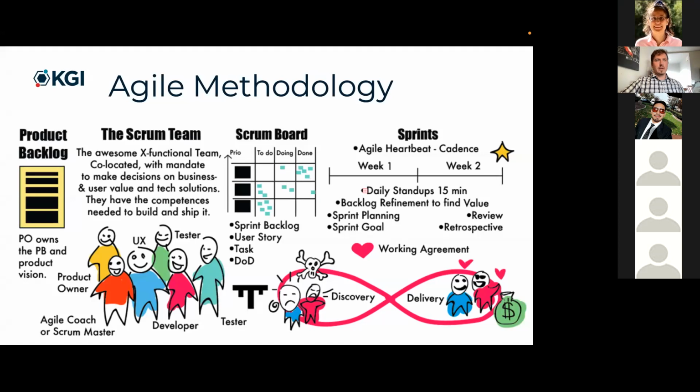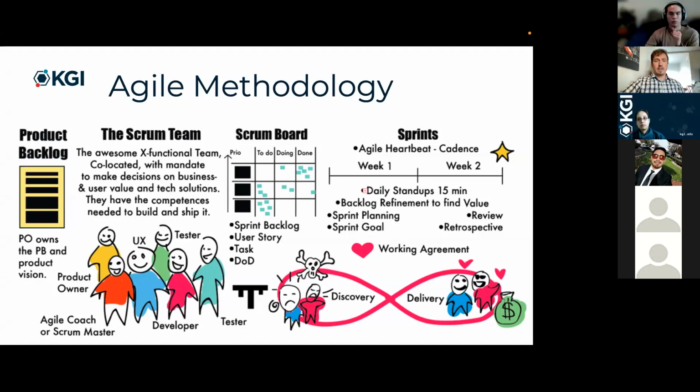Okay, it is 4:14, so let's get back online. One thing that I failed to remember on this slide was DoD. DoD is definition of done. And so it's essentially just the team aligning with each other about what it means to complete a specific task. So obviously that feeds into the Scrum board. The best way to illustrate that on your Scrum board would be to be very descriptive on your to-dos about what exactly you're trying to accomplish.